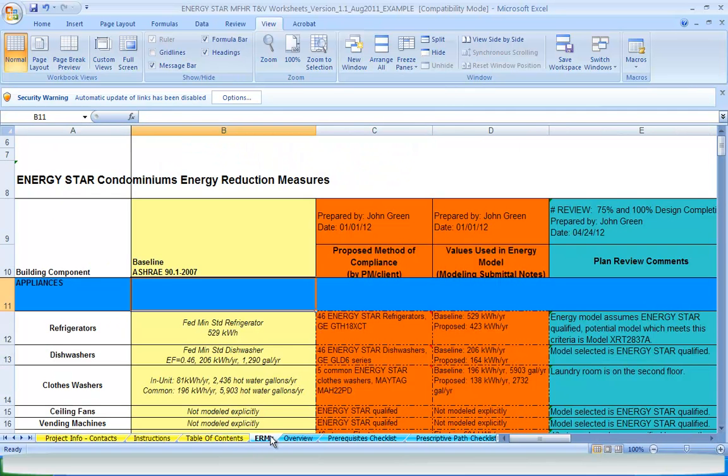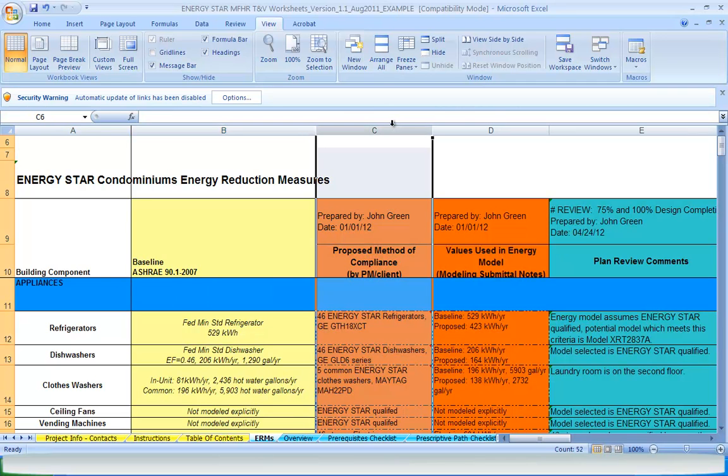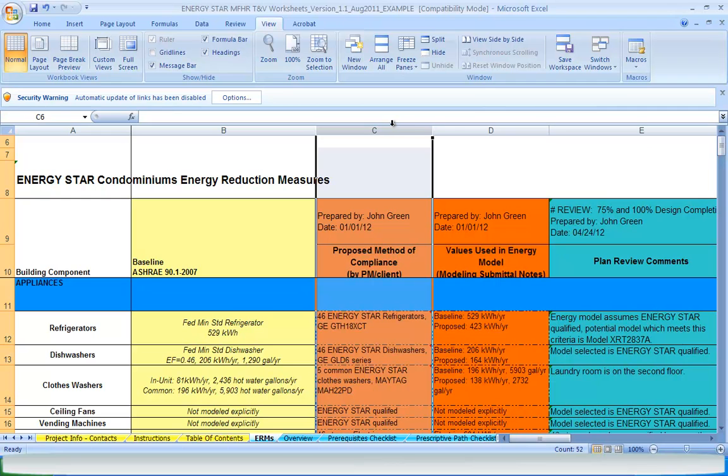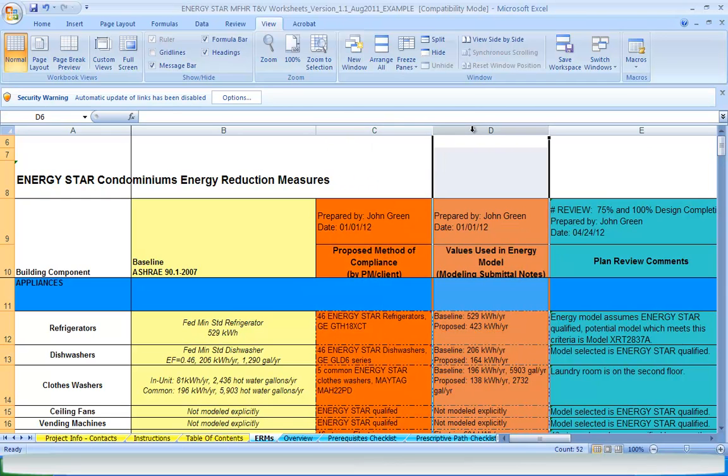Energy reduction measures are first described in the ERMS tab in the column labeled Proposed Method of Compliance. The energy reduction measures are determined by the requirements listed in the prescriptive path, or, when following the performance path, measures are determined by the design team, and these descriptions provide guidance to determine what will be used for modeling inputs and assumptions, which is entered on the same tab in the column labeled Values Used in Energy Model.